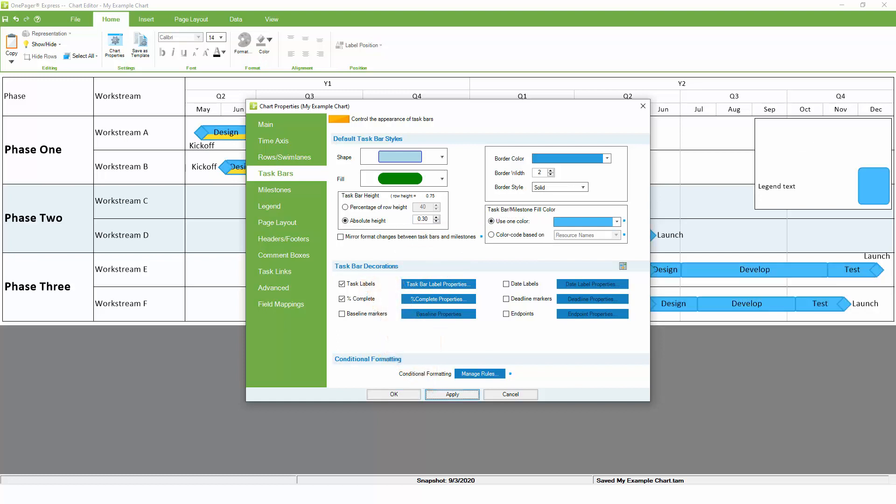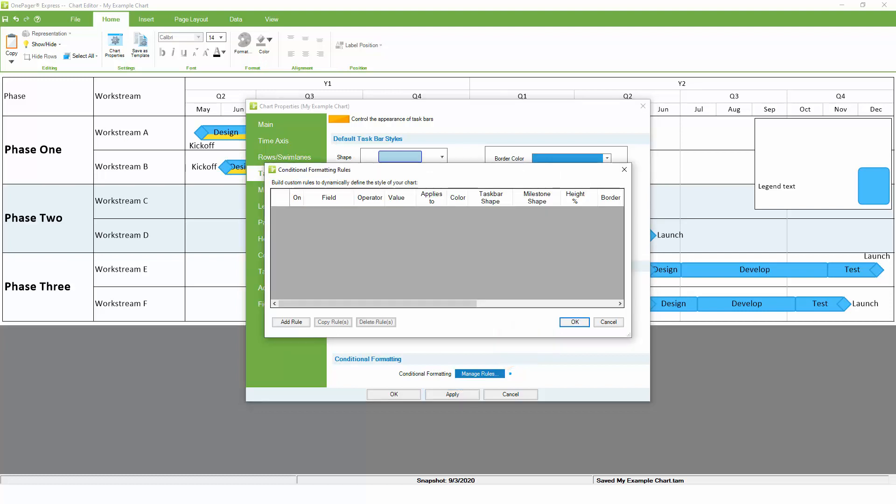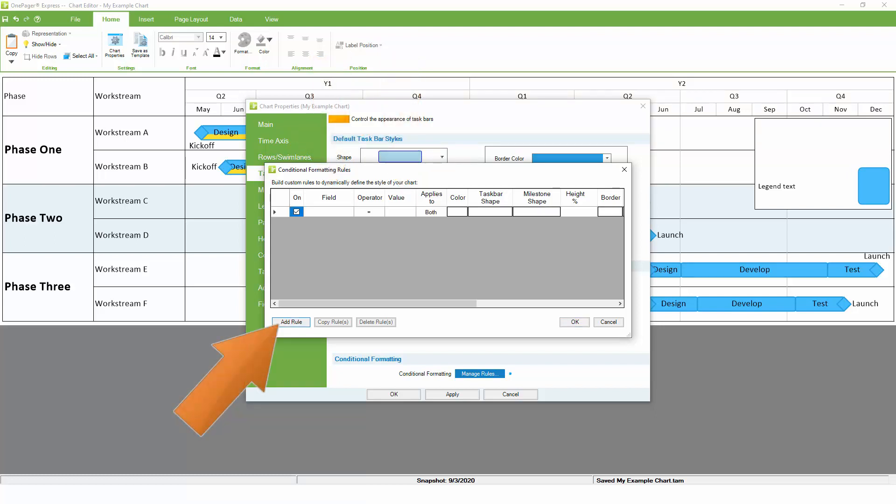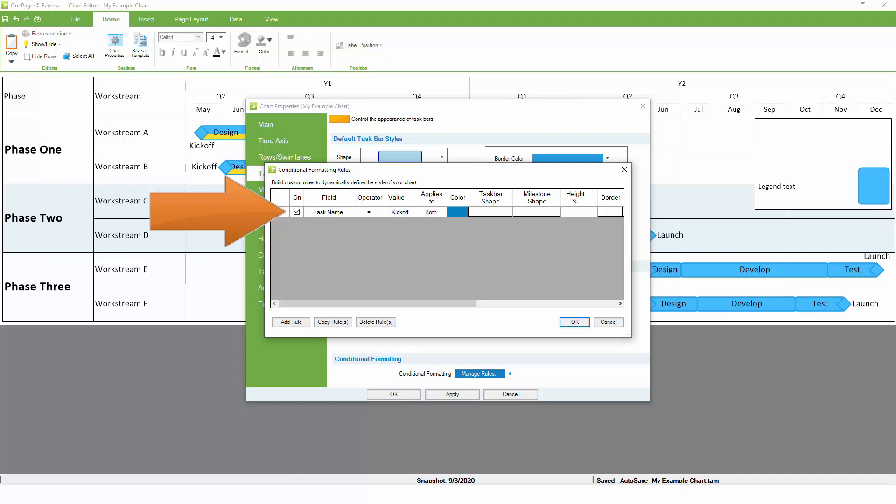Now click on the Manage Rules button to create conditional formatting rules. In conditional formatting, we want to pick the field from Excel that we want to evaluate, and what value we want to look for. Common fields for conditional formatting include status, resource assignment, phase, and task name or category. In this example, we'll assign formatting based on the task name.